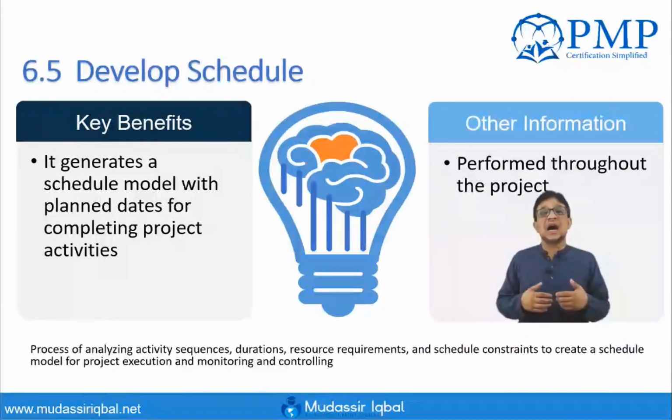Most of our projects do not have realistic timelines. There are many reasons for it: resource delays, lead times in procurement, and other factors. But the most important factor in my view, and at least what I have experienced, is that we do not put enough time into analyzing the schedule, and the risk and what could go wrong. We don't want to see that there is a chance of our project being delayed by 15 days or 15% or 20%. We don't want to look into that area. We don't want to provide this information to the management.